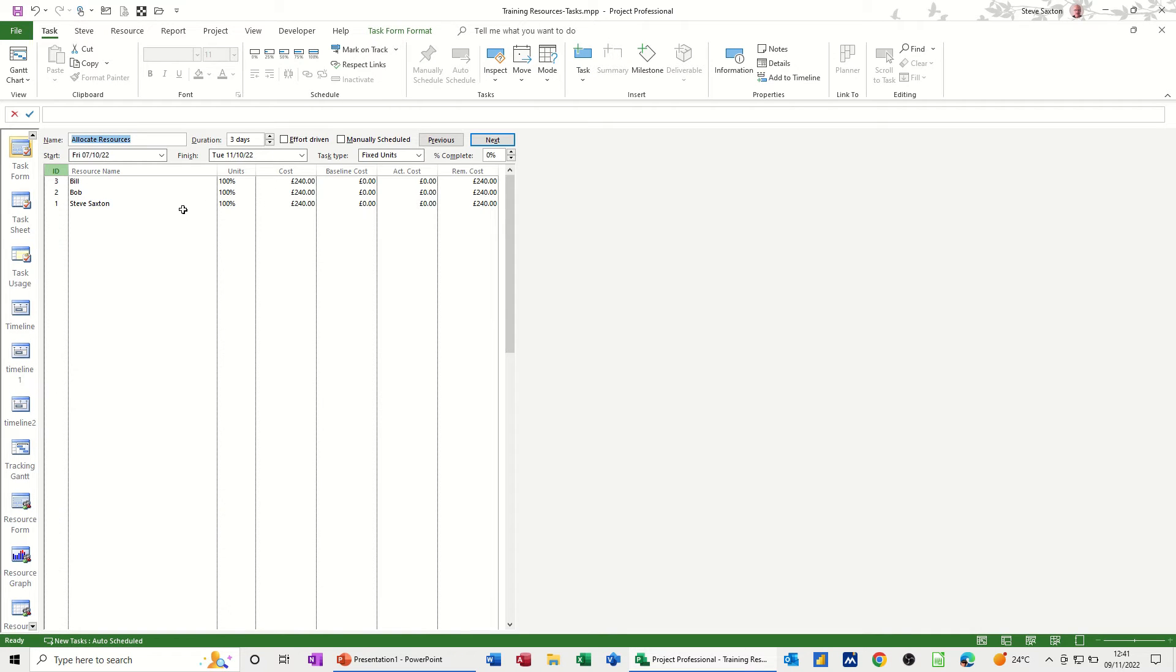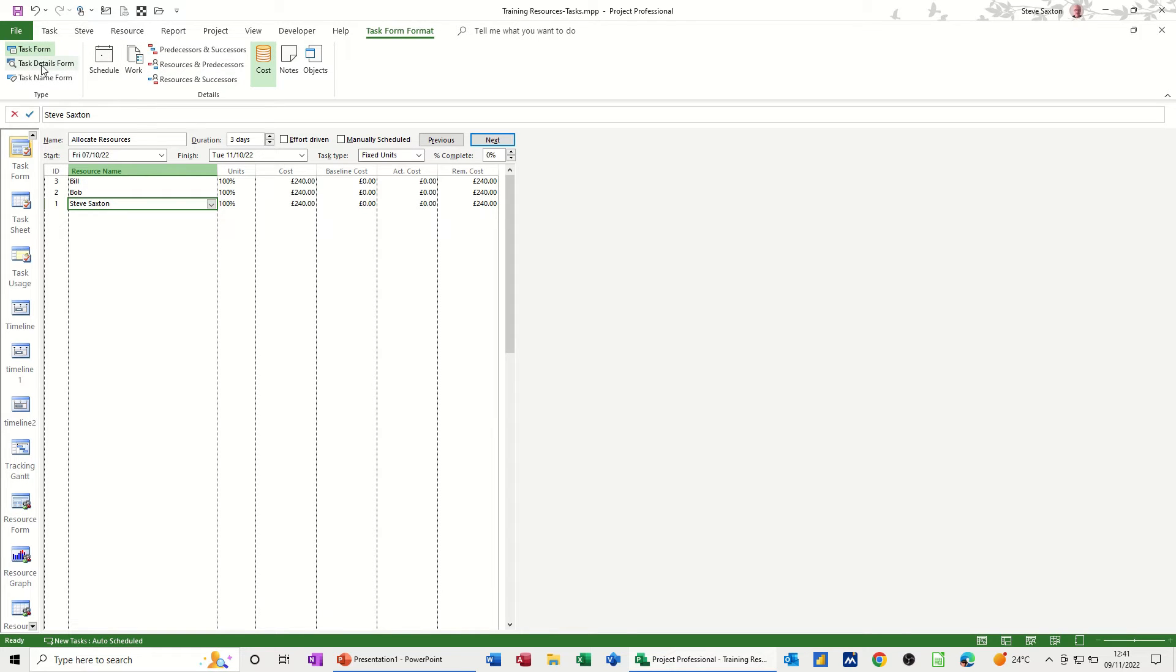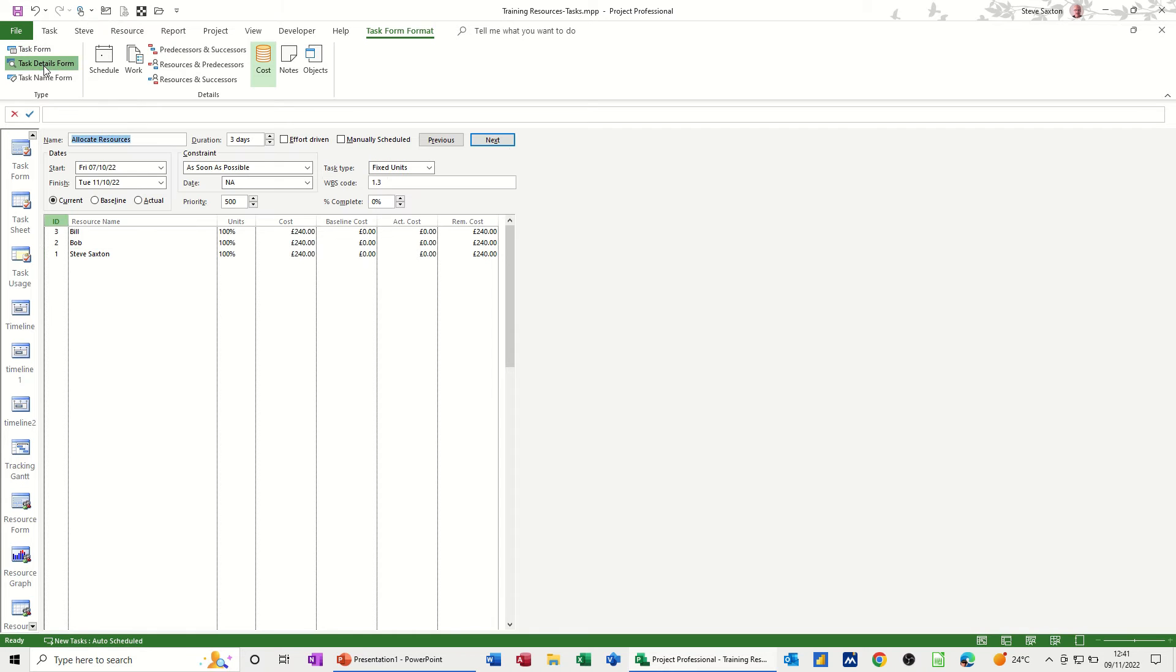What you also get when you go into a form is this tab up here in task form format, where you can click and get extra objects or items. So you've got task form, which I'm on, then you've got details form, so this is the stuff you've got at the moment. So this is a fixed unit task, it's not complete, three days duration, effort driven is not ticked and it's not a manual task. If you go into this one, details form, that gives you a little bit more information, so you've got constraints on there and these options here.